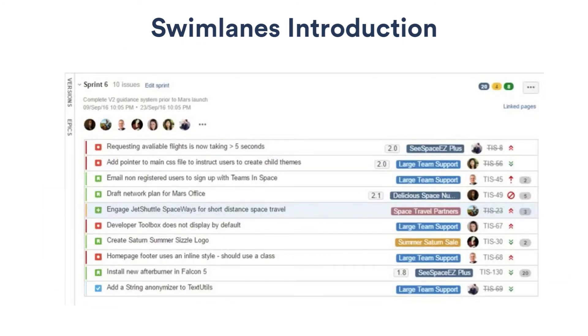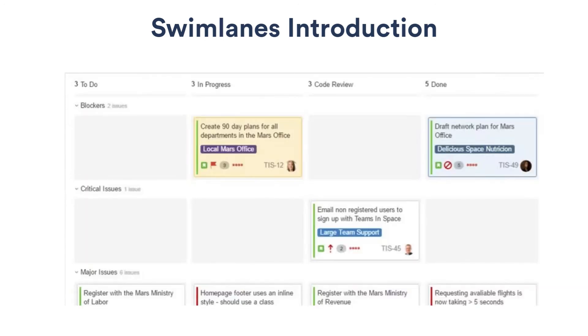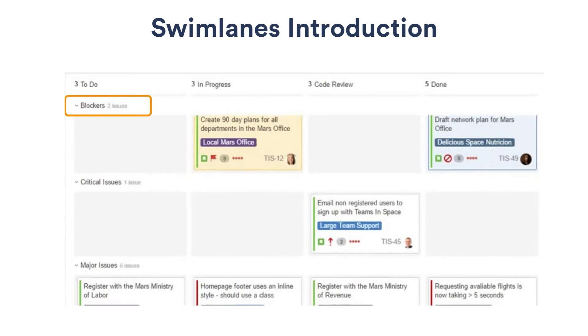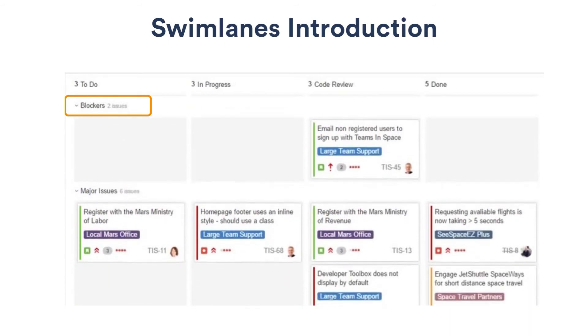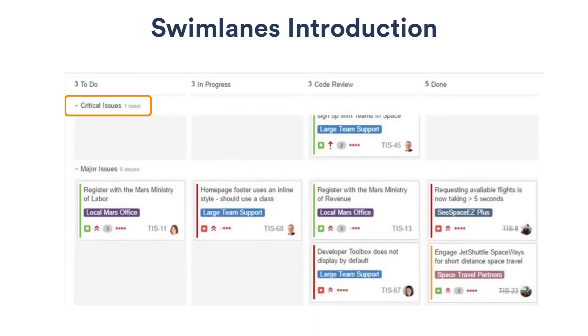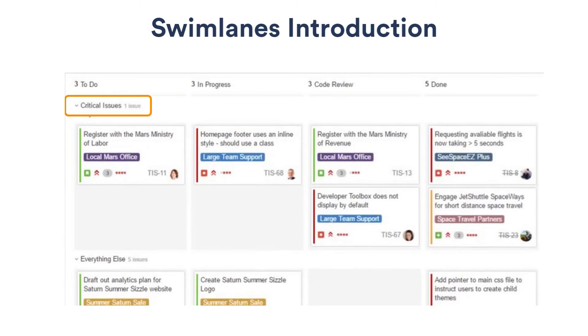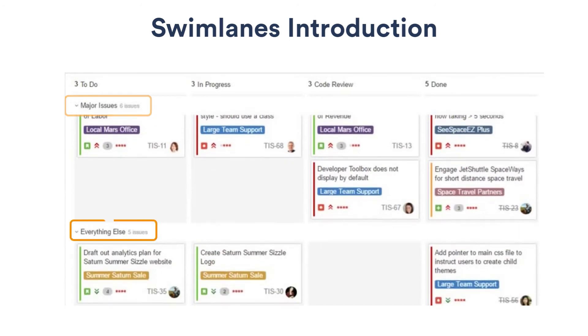Let's go to the active sprints view of my team's board and look at a few swim lane examples. Here we use swim lanes to pull together items by importance. That way we can see where our highest priority issues stand at a single glance. My team's board is set up to show issues labeled as blockers first, followed by critical issues, and then major issues.